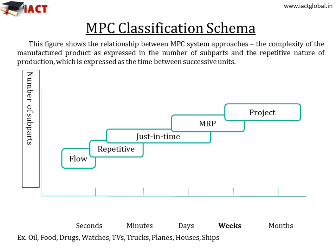The last form of MPC depicted in the figure is the project type, which is applied to unique long lead-time products such as ships and highly customized products. The primary concern is usually management of the time dimension. Project management attempts to continually assess partially completed project status in terms of expected completion dates and costs. Some firms have successfully integrated MRP approaches with project management, particularly effective in planning and controlling the combined activities of engineering and manufacturing.